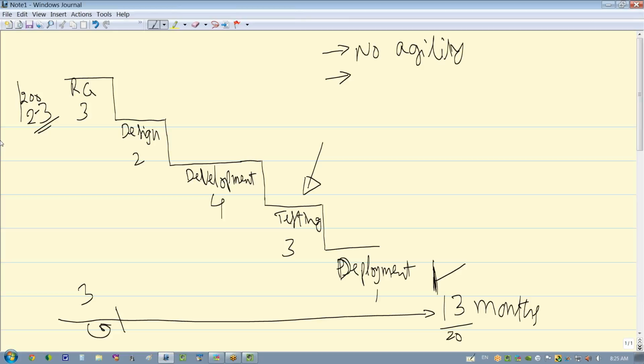Rather, prioritize all the requirements that you have. Take the most prioritized items. Go back to your business user and say, hey, I understand you got your 200 requirements. You want us to knock down these 200 requirements. Very good, got it. 200 pieces of tasks. Tell me the priority of all these 200 items. Which of them have the topmost priority, that I can't deliver the project without them? And then most of the business users will say, okay, I can live with these 5 items on day one. Okay, so deliver those 5 items only. Take a couple of months and deliver those 5 items.